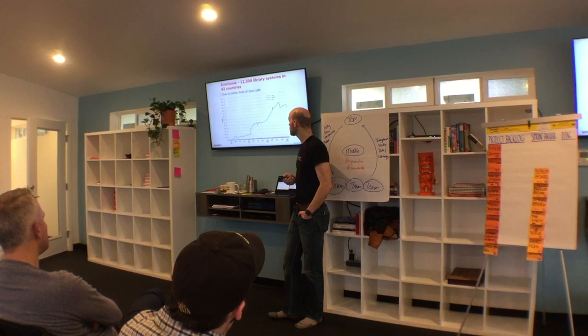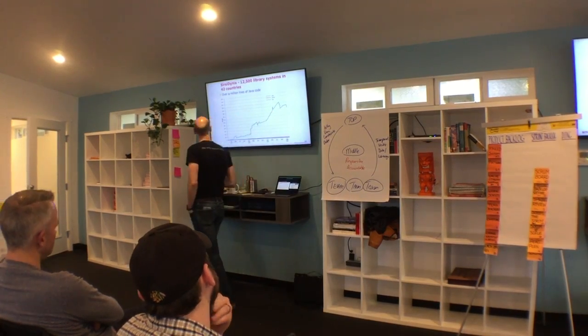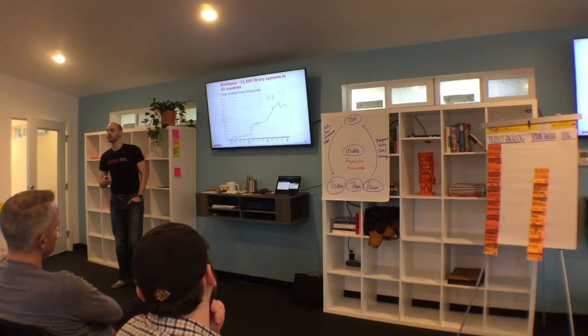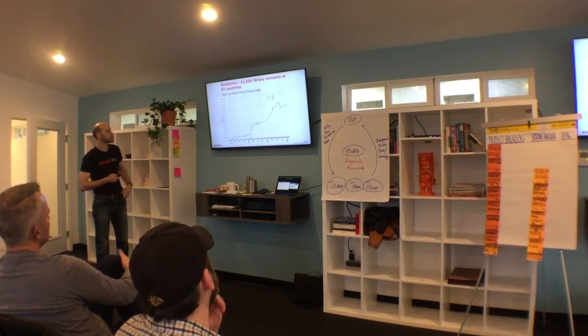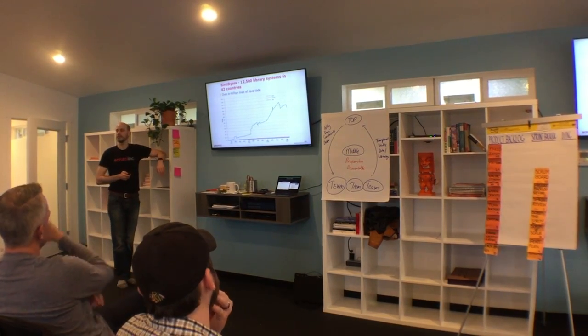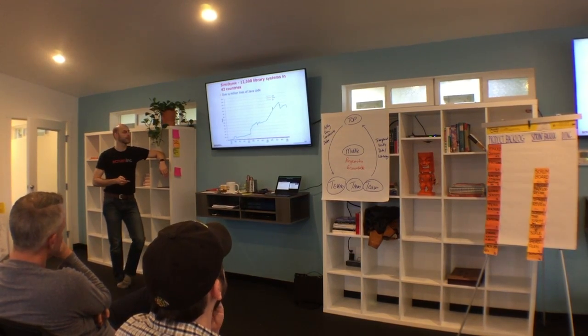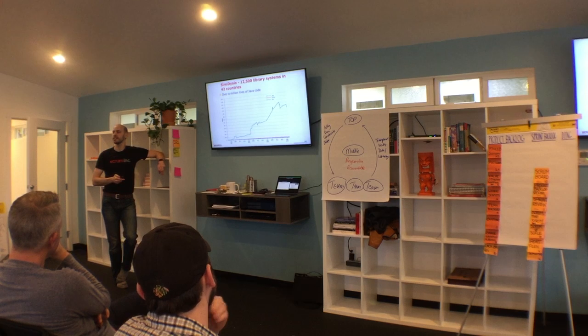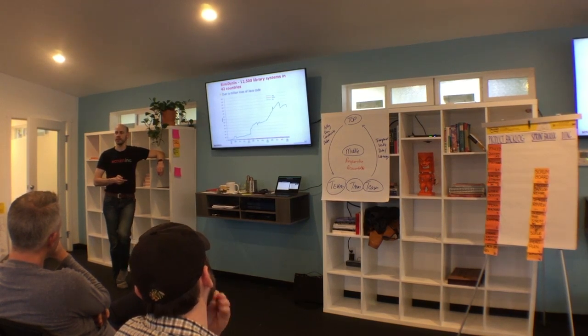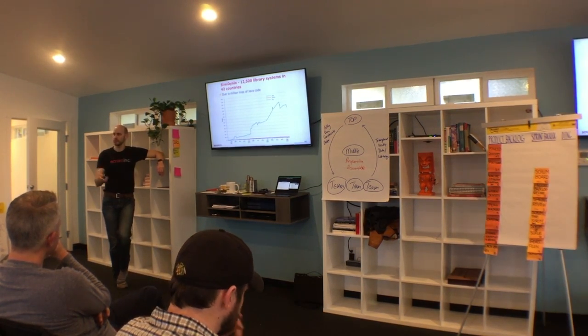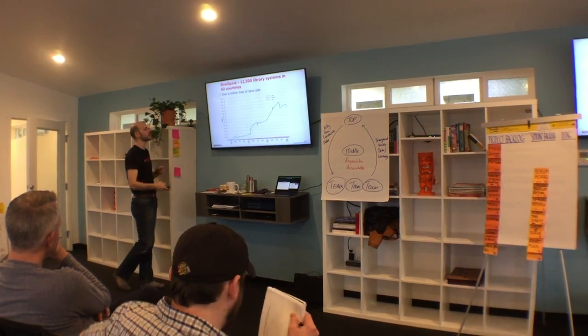This was not a small project. This was a software project, and they have over 1 million lines of Java code. So this is a highly complex, large project that they're doing simultaneously in 5 deliveries, 5 geographies, and getting exceptionally fast speed through what we now call the distributed daily stand-up, or the distributed daily meeting, which means hosting it more than once per day, once for each geography in a rolling time zone.